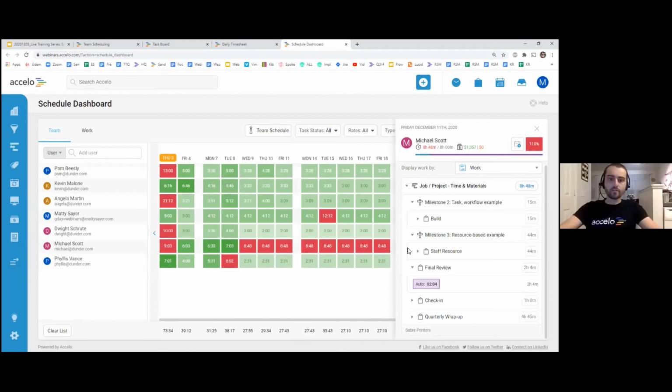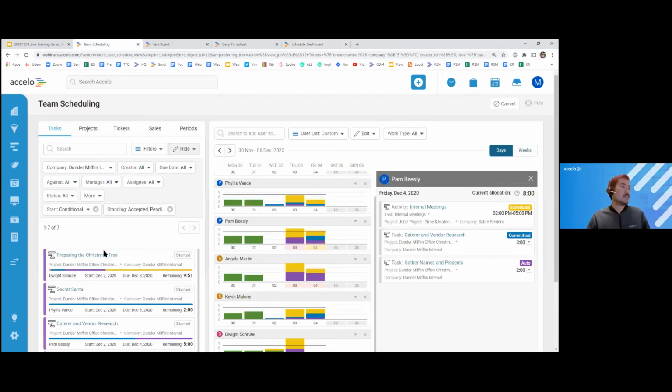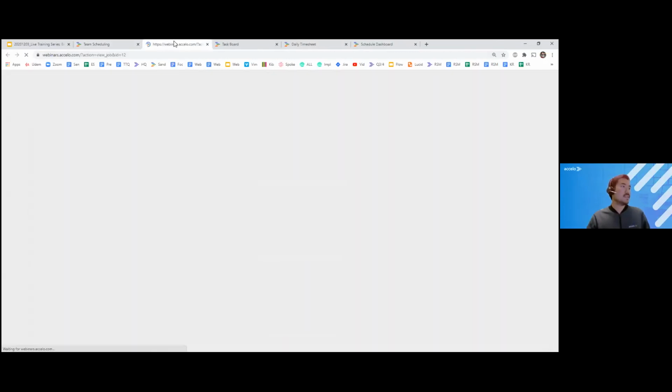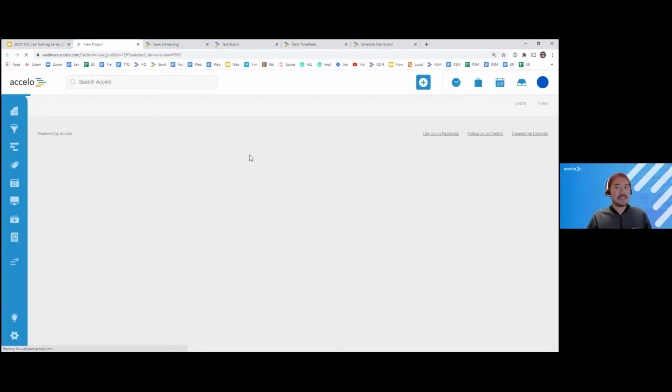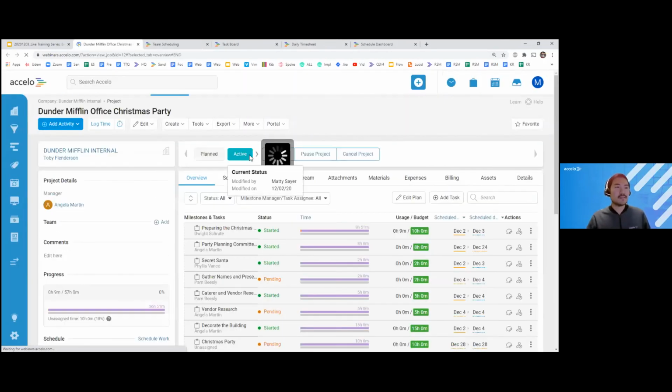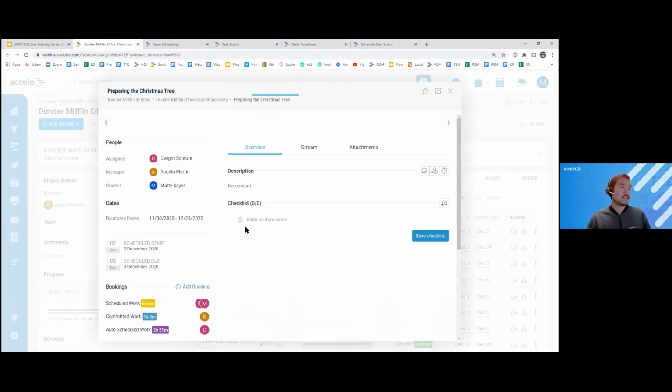All right, thank you. Here's another one for you. Can someone adjust the estimated time remaining even if they don't log time? The estimated time remaining, yes. So if you actually pull back to the original project, as long as you're a project manager and you have the ability to edit the project plan, you can access the remaining project budget time directly from the individual task.